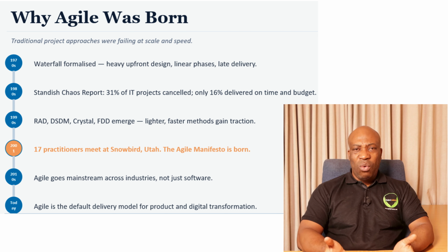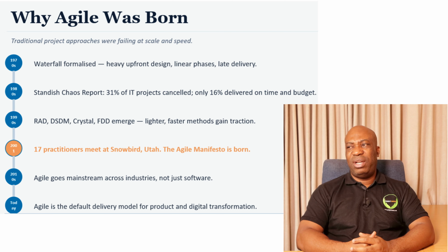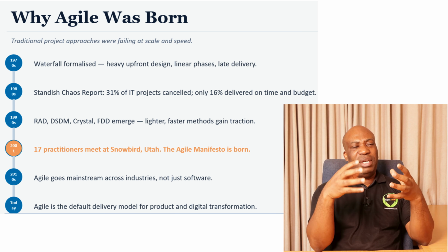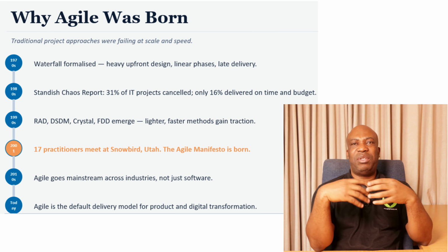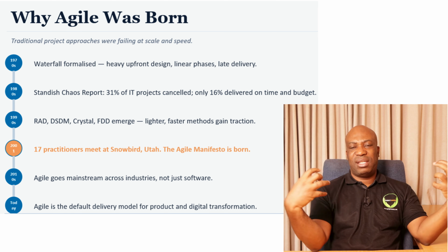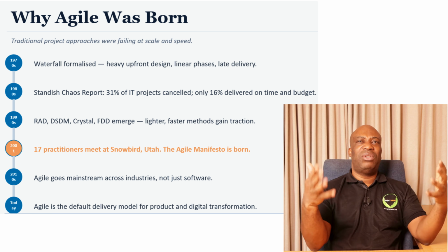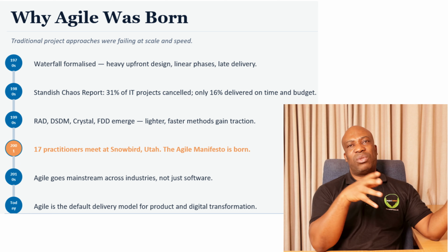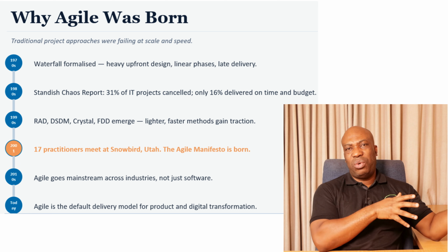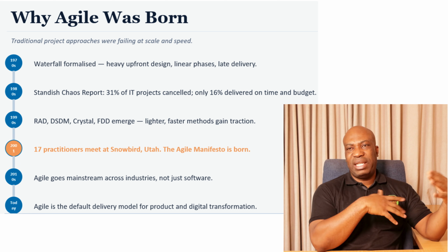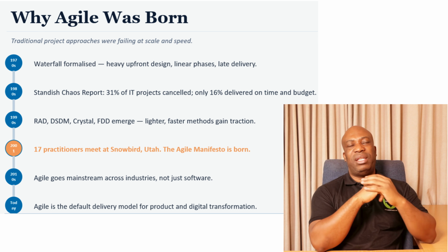So the waterfall approach was actually very formalized, and predictive was also not allowing for scaling, which means as you try to increase the scope, predictive does not allow you to do that. If you want to increase the scope or you want to change anything, it has to go through the formal change process, get approved, then you come back and change the documents.